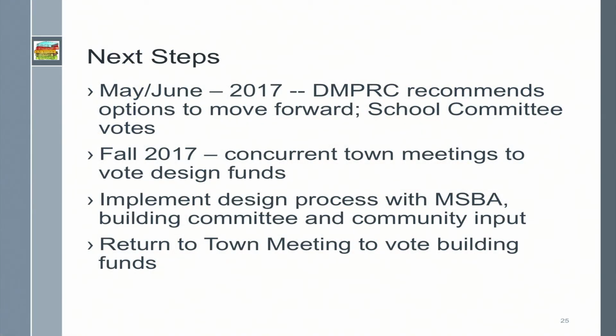So those are all of our options. I just want to take a moment to highlight some key milestones as we move ahead. Right now, we're in the process of soliciting community feedback from people like you, online and at public forums in person. At the end of May, our subcommittee will recommend which options to move forward to the school committee. The school committee will then vote and share their recommendation with the MSBA. On December 4th, we plan to have concurrent town meetings in Acton and Boxborough to vote on the design funds, and then, if approved, we will move into the design phase of this project. When that phase is done, we will return to town meeting in both towns to vote building funds.